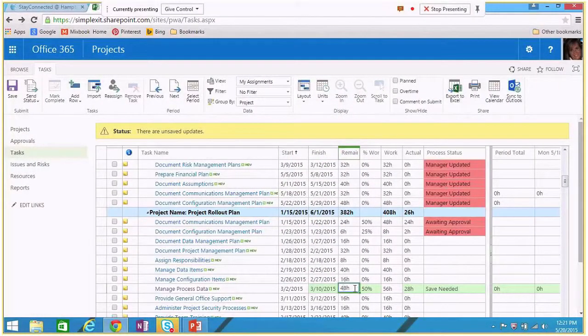Oh, good question. Not hard to do to add additional tasks. As a team member, as somebody with the $7 subscription, I have access to my tasks. I can change the actual information of my task. And when I say change, I really mean propose to change, because everything goes back to the person who's handling the project schedule. And when I say project manager, that term is used loosely. Sometimes it's a project scheduler, or a COO, or whoever is handling that project schedule.